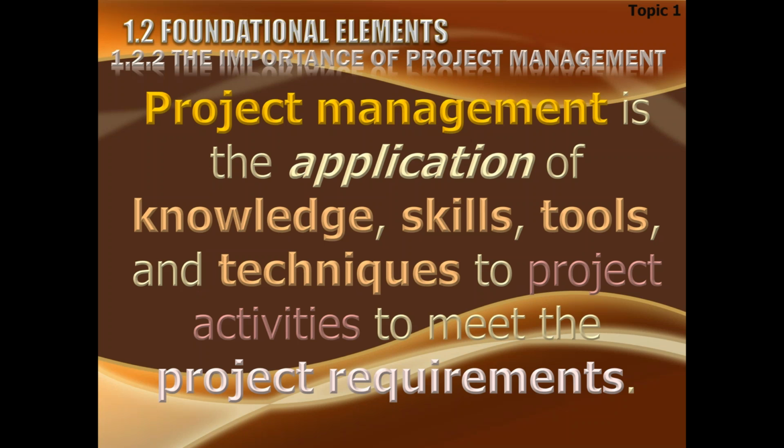So, only the project activities which are necessary to meet the project requirements, which are contributing towards the development of the project product. Anything you do which is not contributing towards the project deliverable or fulfilling the project requirements, that is not a project activity, and therefore the project management knowledge, skills, tools, and techniques should not be used on out of scope activities. That is the lesson, that is the message coming out of this definition.